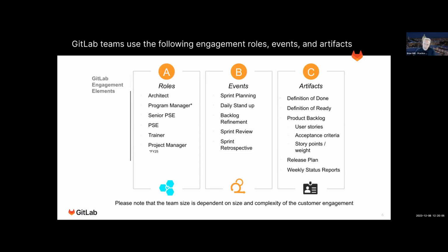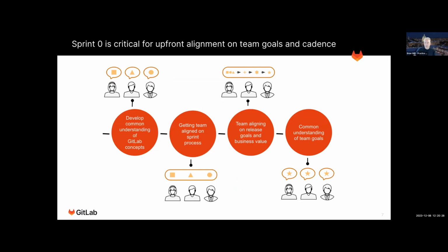A release plan if that's necessary, again depending on the size of the effort, and then of course weekly status reports. I always recommend to send status reports on the same day every week, so people get into a cadence, and you can set expectations with the teams you work with, or with the customer. So this is really just a real quick breeze of how this works.